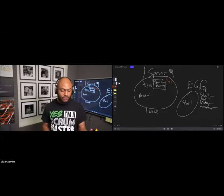These are the five original ceremonies or events that happen in a sprint: one, the sprint itself, which contains everything; two, the daily standup; three, sprint planning; four, the sprint review; and five, the retrospective. The sprint is time-boxed, so the sprint ends when the sprint ends — but within that time box, all of these other things have to happen.